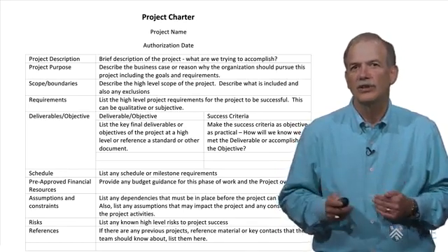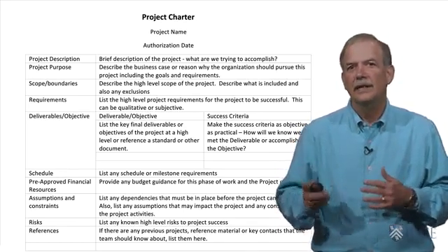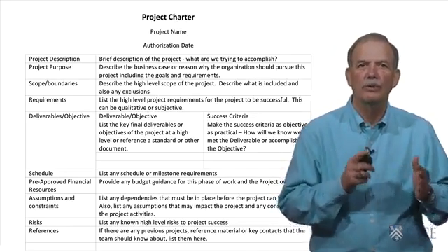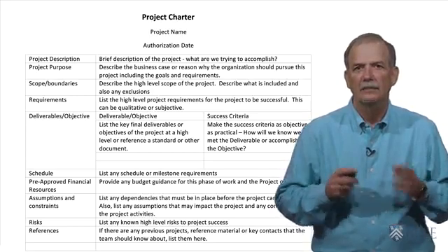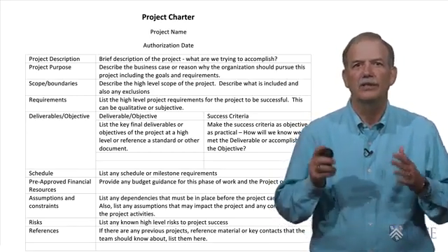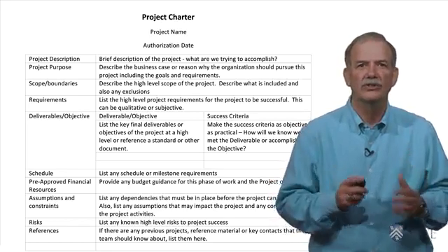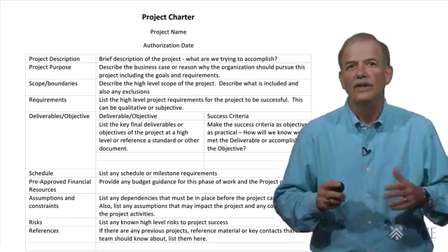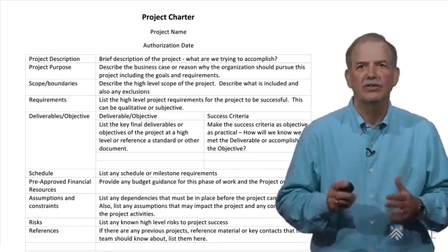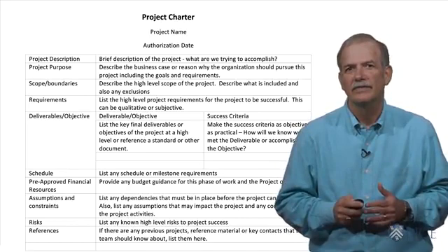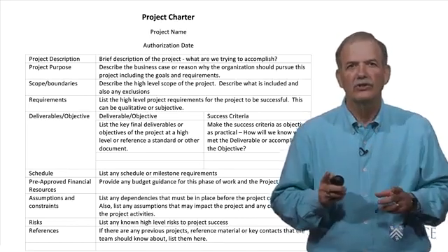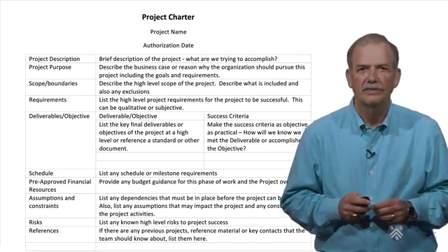Next comes the project scope. This is different than the project description, in that we should include a high-level description of the work we're about to undertake. It might be develop an electric car from commercially available parts to compete in a race on a certain date. Or the project will design and construct an approved design for a battery-powered single-seat car. The project scope should also describe what is excluded from the project.